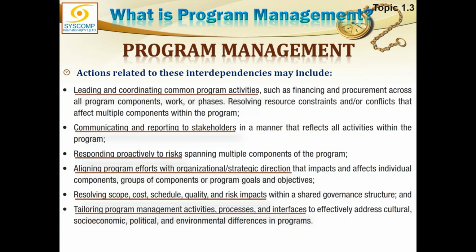Especially dealing with those stakeholders which are common to more than one project, that would automatically become the responsibility of the program manager, right? So communicating and reporting to those stakeholders in a manner that reflects all activities within the program. It has to be a unified approach. You cannot have the same stakeholder being dealt with by 3 different project managers in 3 different ways. We want to be consistent. That is good program management.